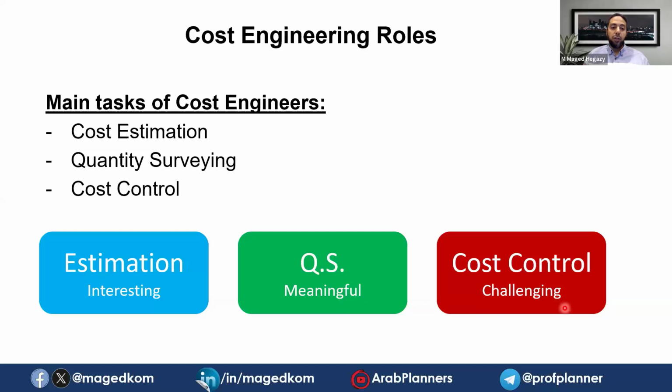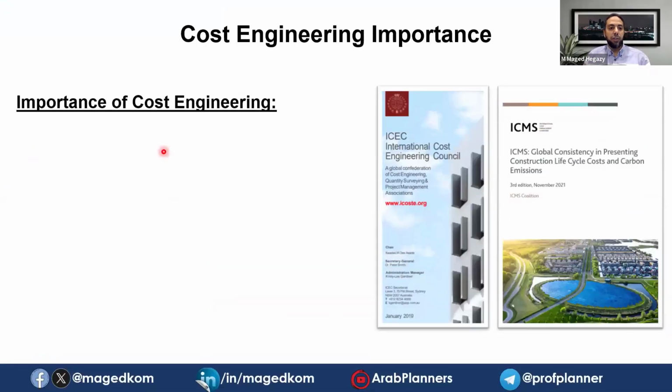working in cost control to get appropriate allocation of the cost to the items they actually spend these expenditures or these expenses on. So allocate these expenses appropriately to compare with the estimation. You need to have proper cost estimation with a good level of detail, so you can control it and compare if you are doing good, over budget, or below budget.